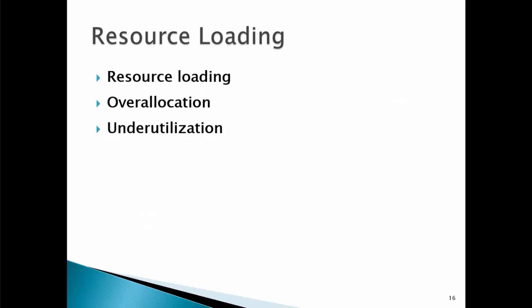After controlling the team, knowing exactly how to deal with the different behaviors that you have in the team, and making them collaborative, working together as one team, at that point you can do what's called resource loading. Resource loading refers to the amount of individual resources in an existing schedule that is required during specific time periods.